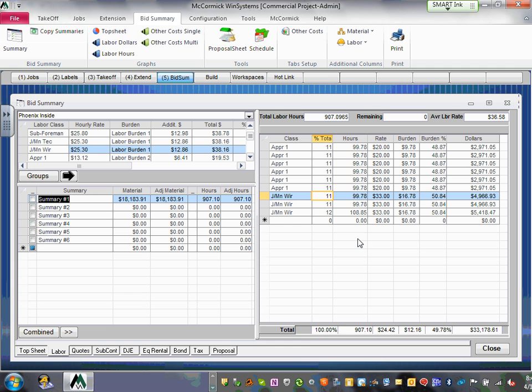Can you guys see that, Adam? It adds up to 100% here. Adding all these percentages, that's your labor. So those guys will be, for the most part, equally working on the project. Now we didn't put a foreman here. You could put a foreman there and give him another $5 extra. One of the journeymen, the one getting more time here, is going to be our foreman. You can add another $5 if you want to. That's what your company will be dealing with. For the time being, this is good enough.